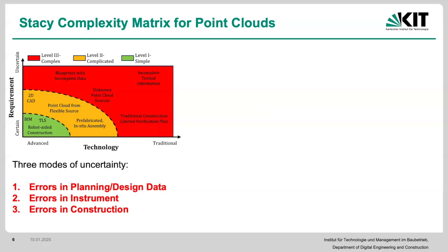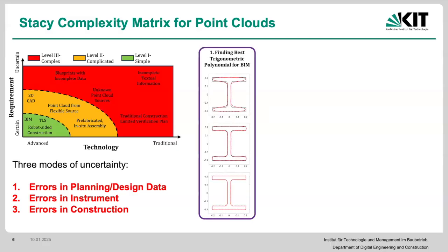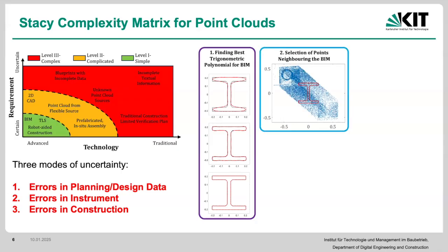What element of the model. The second level is a bit more complex, and this is the case of prefabricated elements. So we know that the size of the element is not going to change. So we know that we're looking for a column that has this size. Or if it is, you can still parametrically identify that, or let's say scale it somehow, right? That's the second level that we have, and at least we have a 2D model of that. And then the third level is that we kind of go free fall, meaning that the element itself also can change in size, and it's not supposed to be in the proper location either. Okay? These are how basically I've done that, and every one of these is a bit more complex problem.